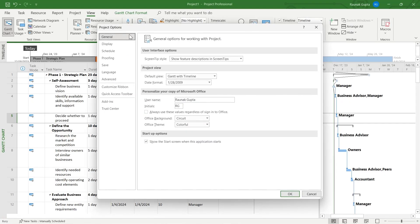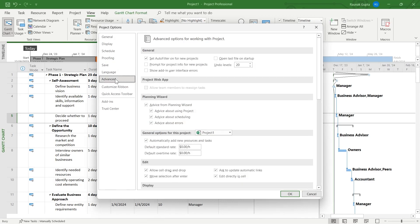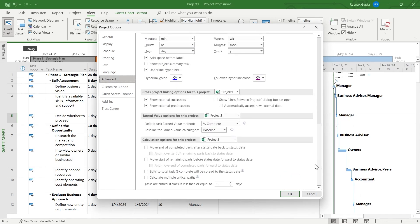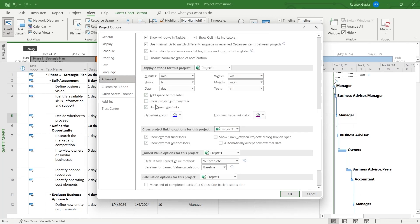Now you will see this Project Options tab appearing on your screen. In this you will have to click on Advanced. After you click on Advanced, you will have to scroll down at the bottom of your screen and simply click on this 'Show project summary task' option.